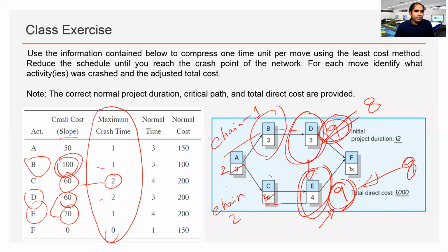We are trying to find the optimum cost time point. Do we know the total amount that is allocated? This approach is considering the fact that we have the money, we just need to reduce the project duration. So it will also help us in identifying the extra money needed per day for per day reduction in the project duration. Again, the top management is in a position to decide whether that additional cost is justified.